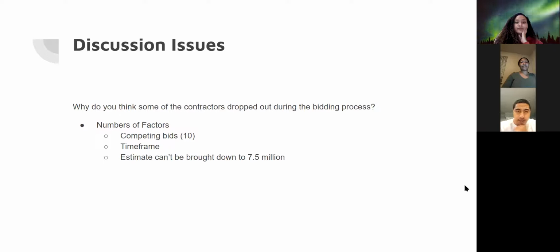Next question was, why do you think some of the contractors dropped out during the bidding process? There's a number of factors why contractors would drop out. One, some of them would be the competing bids. There's like 10 people competing for this project. So some companies might already figure out the likelihood that they won't get in, and they'll just drop out. And other factors are the time frame.